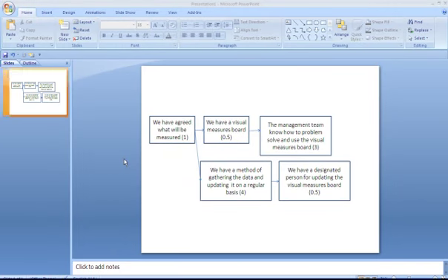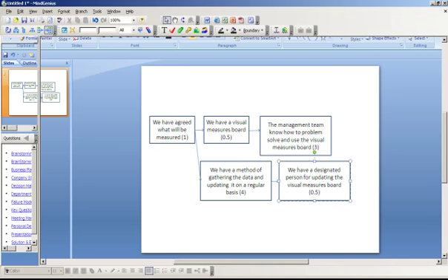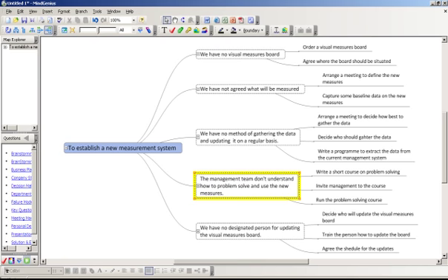So now, having put in arrows, we've established that our critical chain, which is the longest chain, which is 1 day, 4 days and 0.5 days, is 5.5 days. That's our longest chain in order to achieve our end objective. So we now have our plan, and the final thing that we then do is go back to our original plan, and what we're now going to do is capture all the actions required in order to achieve each of these objectives.